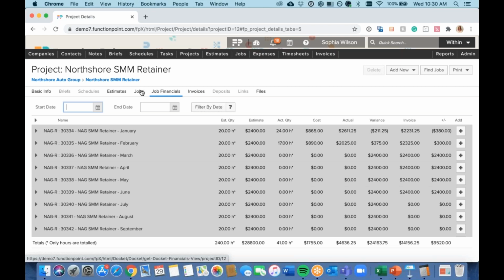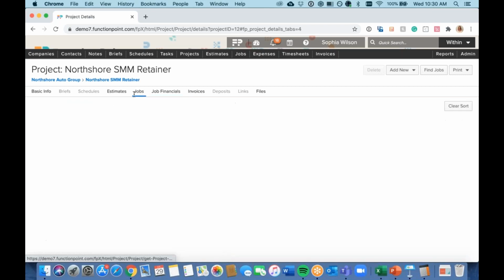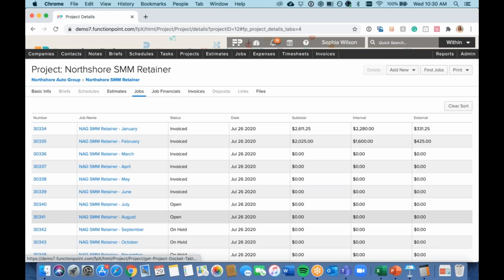So similar to how I had just gone through with the jobs and opened that upcoming month's job, you would then need to go into the schedule itself as well and assign the first task. Again, we'd probably need to look at your schedule and see if we need to assign all tasks immediately, or if you have dependency set up and just need to start by activating the first one that will trigger that waterfall. But that would be how you would best use that.